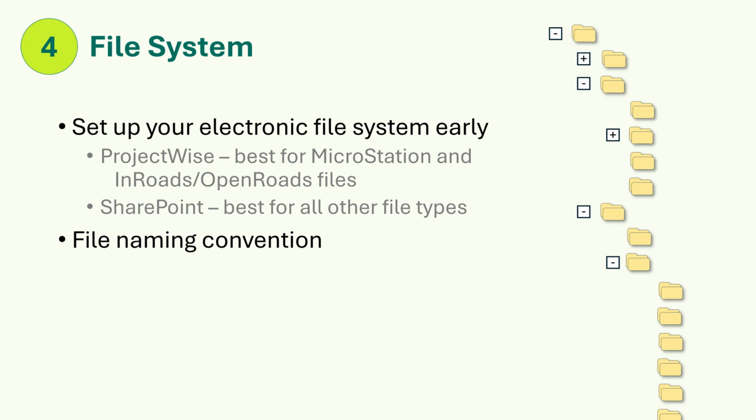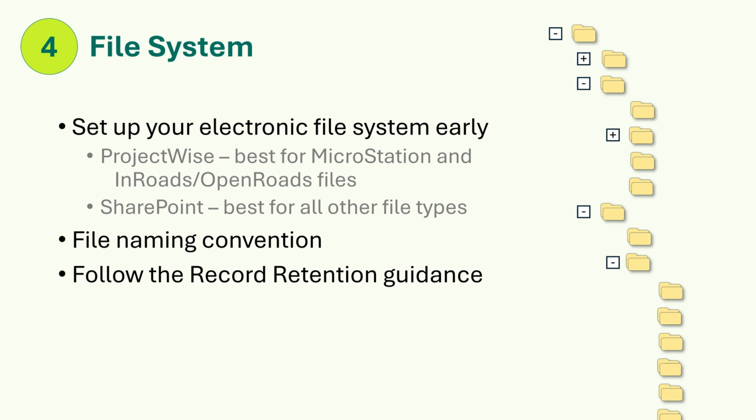You need to decide what the document naming convention will be. Follow WSDOT record retention guidance for document management throughout the course of your project. Make sure it is clear for maintaining hard copy and electronic files, sequestering original documents, dates and project information on documents, copying documents, and the maintenance of document logs.